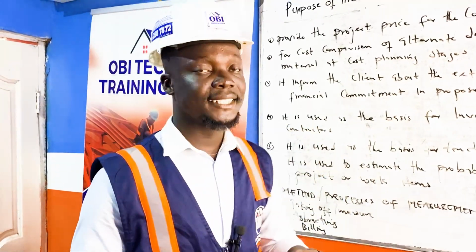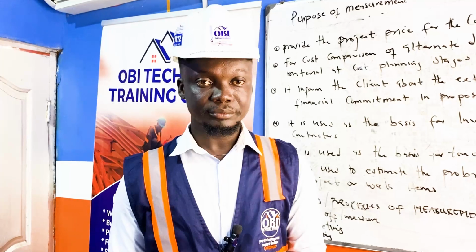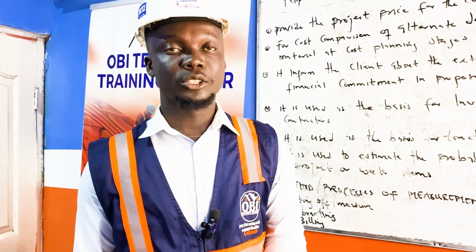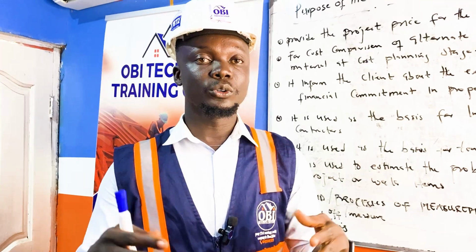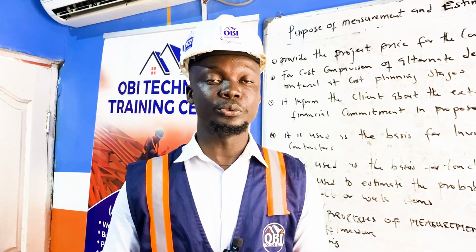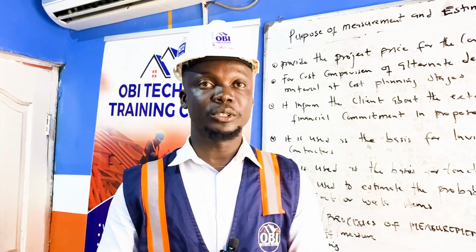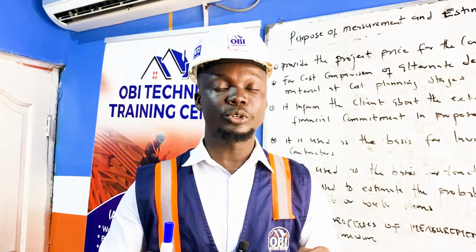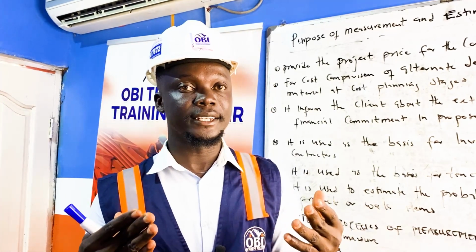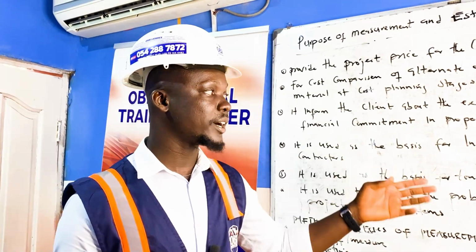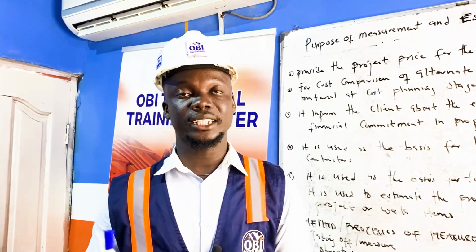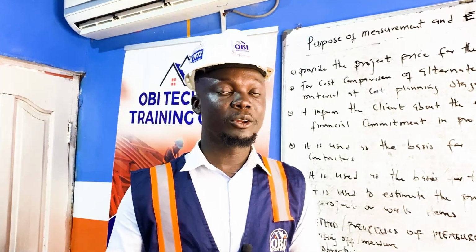So for an estimate to be done, they'll invite various contractors who are interested in the project to tender for the project. So tendering for the project, they will also prepare their BOQ and send it to the consulting team for them to analyze it and check if they are qualified for the project. So this will be used as the basis to check the contractor's bill of quantity that is